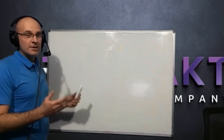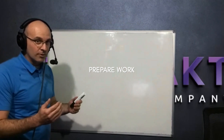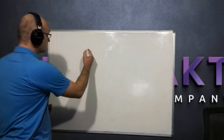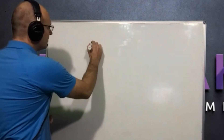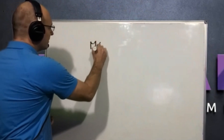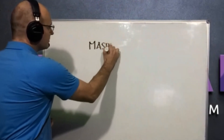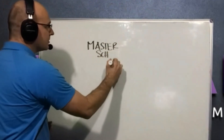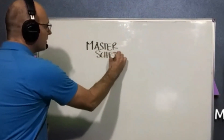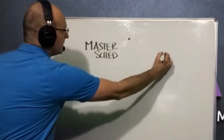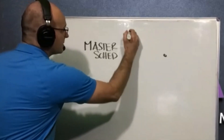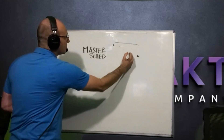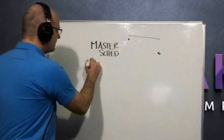The purpose of your look-ahead schedule is to prepare work. Let me show it to you in the frame from start to finish. On projects, we will always have a master schedule, and that master schedule will provide the start and the end date, and it will also provide milestones in between — your overall schedule and your milestones.